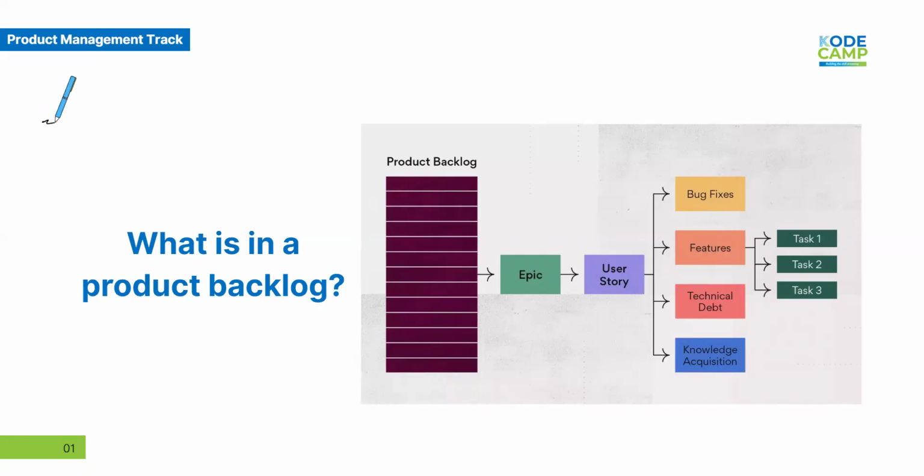What I usually tell people is this: if a bug affects a user's ability to complete a task, it goes right to the top of the backlog. You don't have to think twice, you don't have to delay it. Don't plan for the next quarter with a bug. Fix it as soon as possible. You know what? Scratch that. Fix it as soon as you see it, right? Because it is a bug. It is something that is bugging your user. And if it bugs your user, you're sending them right to your competitors because they will look for other options that do not have those bugs.